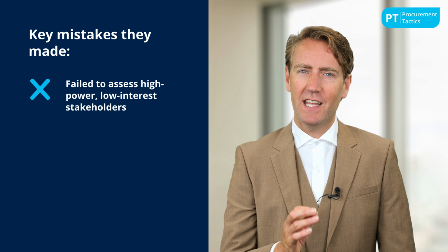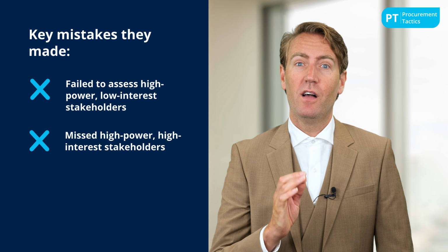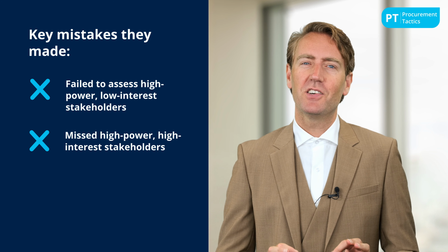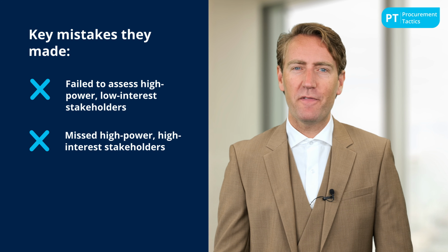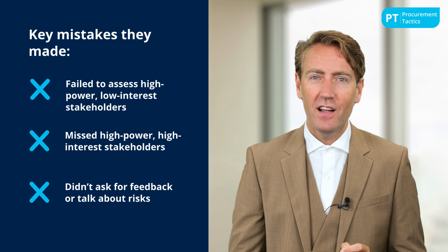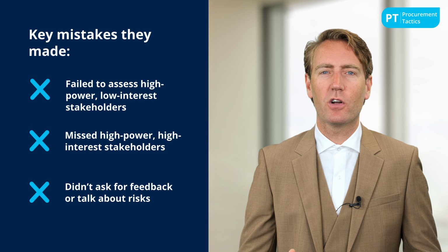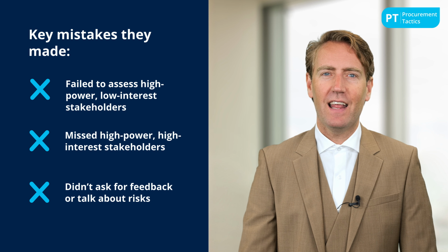Those people needed to be managed carefully. She also missed some key high power, high interest stakeholders who could have helped but weren't included early on. In the engagement phase, she held joint meetings, presented objectives and timelines, but didn't ask for feedback or talk about risks. There was no buy-in, no alignment, and no clear approvals.